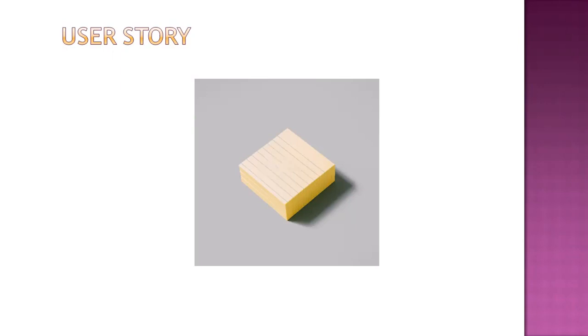And another point I just want to mention, if there is no NFR for a particular user story, you know only the functional detail, you don't know about the non-functional detail. Please keep it as NFR hyphen not applicable. Make this as a practice. What happens? People create user stories for functional.